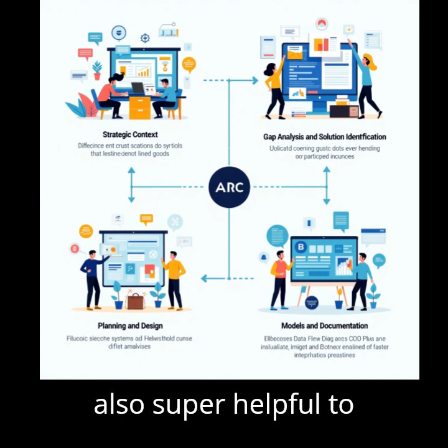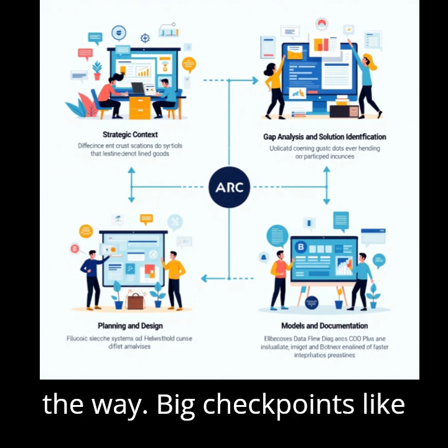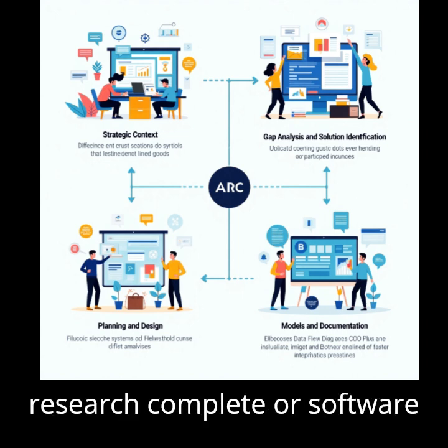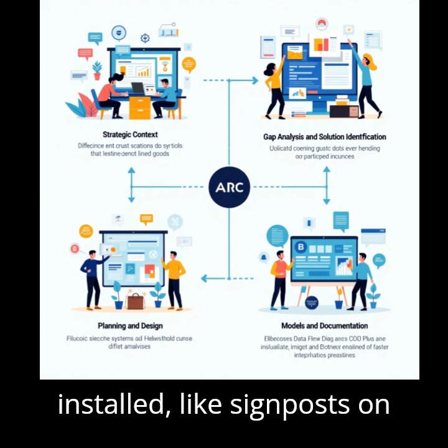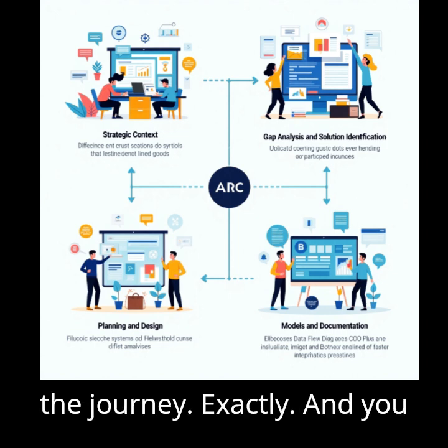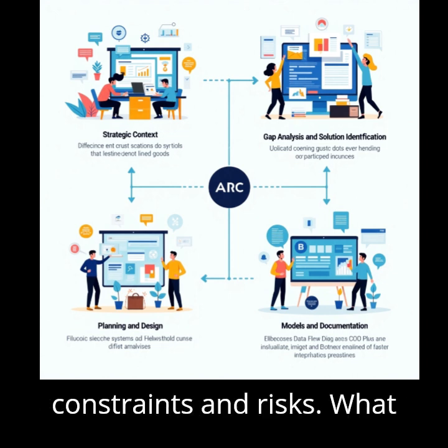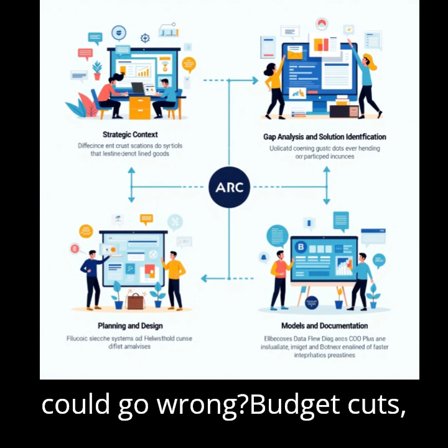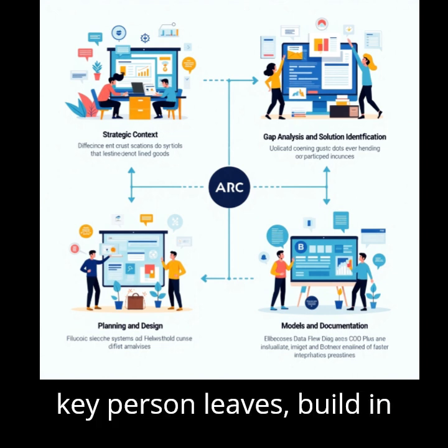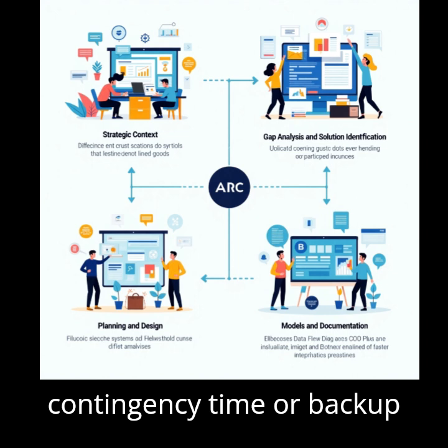It's also super helpful to identify key milestones along the way. Big checkpoints like research complete or software installed. Like signposts on the journey. Exactly. And you absolutely have to consider constraints and risks. What could go wrong? Budget cuts, key person leaves. Build in contingency time or backup plans.